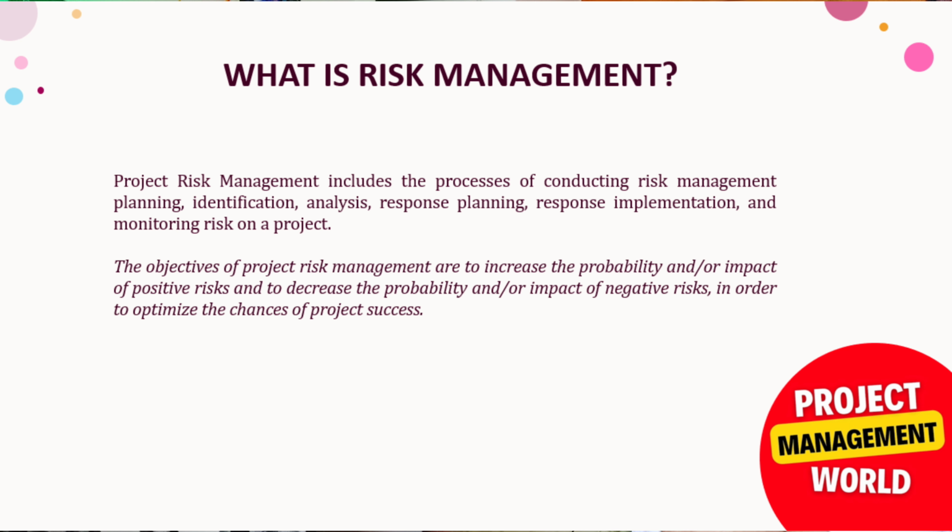It means initially we plan how we are going to identify and monitor the risk, that is what we do in planning. Then we identify the risk, that is the identification. After identification and having the list of risks, we do the analysis. Analysis may include qualitative analysis and quantitative analysis, and then we do probability and impact assessment. Then we do the response planning accordingly. After that we implement those responses, and after implementation we monitor those risks as well, whether we are going as per plan or not. So that is what risk management is.